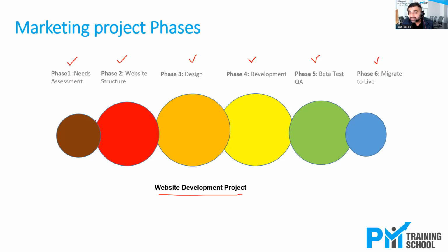For example, if we really want to complete this project, it will be initially chartered or initiated. This is called initiation of a project. When a project manager is assigned, when key resources are assigned, when high-level budget is given, high-level schedule is given, this is called initiation. Based on this project charter or initiation, we develop a big plan.